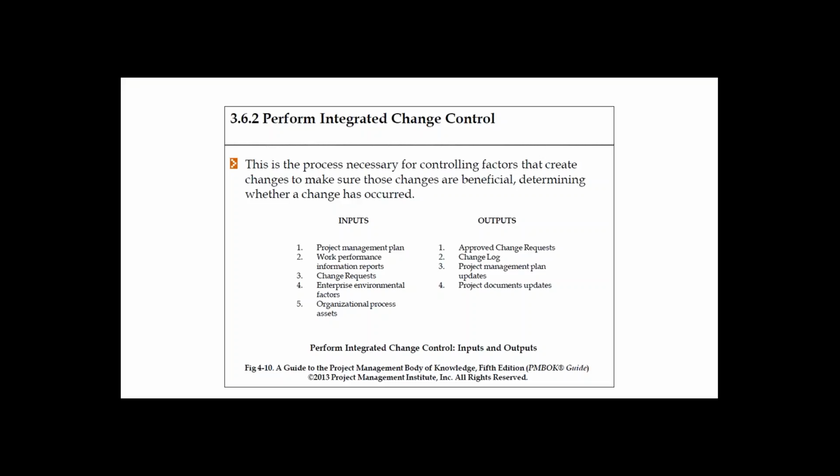You need to give 3 days prior notification, and it has to be updated in a release calendar, and it will be reviewed first internally by the internal team, project team, managers and directors. They will approve it, and then it goes to the appropriate groups, whoever are installing, and then it will be reviewed by the change control board. Then it is finally released. So it's a complicated process, but it definitely helps, because on a daily basis there might be like 1,000 changes in the production environment. Without the proper change management process in place, it is very difficult to organize these changes.